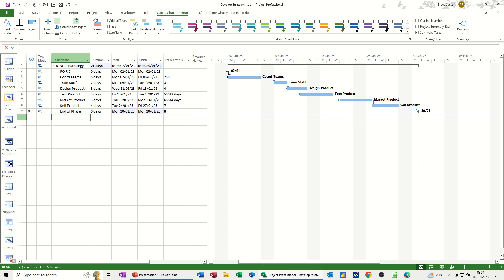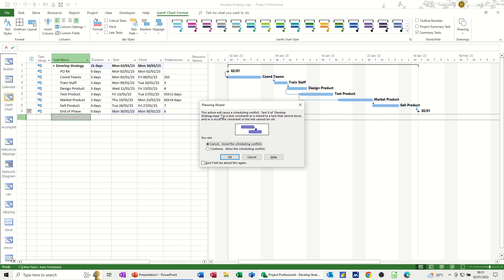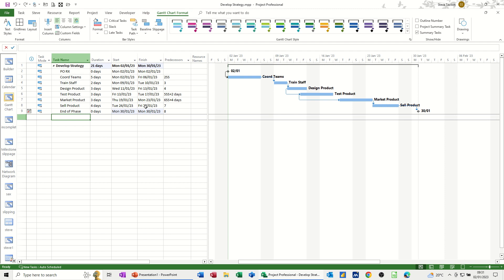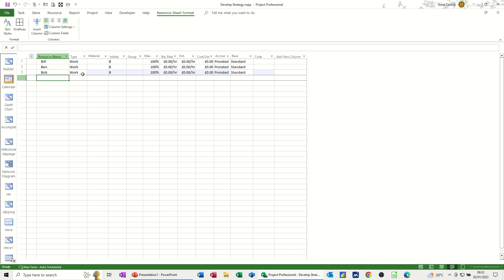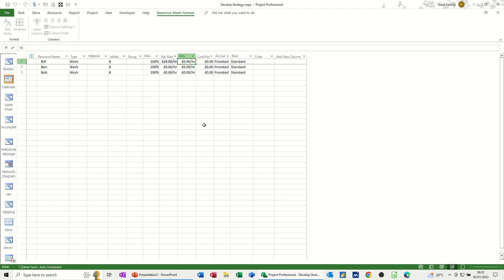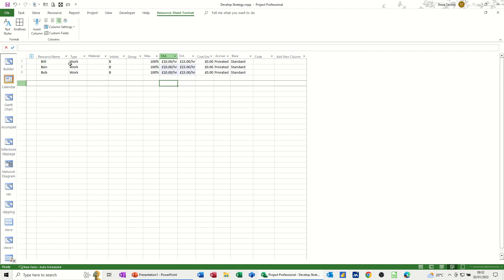Now if this whole project is delayed a couple of days, the Planning Wizard comes up saying this action will cause a scheduling conflict — you've got two options: cancel, or continue and reset that constraint. For now I'll leave that as it is because we need to allocate some people. To allocate people and resources, let's go to the Resource Sheet — down here you've got four buttons and this one is the Resource Sheet. I'm just going to add a couple of people: Bill, Ben and Bob — easy to type. I'll give them all £10 an hour, £15 overtime. Highlight the two and pull it down like in Excel. They're all Work type — eight hours per day is the default.